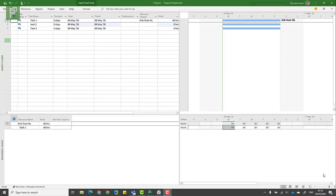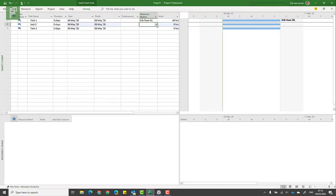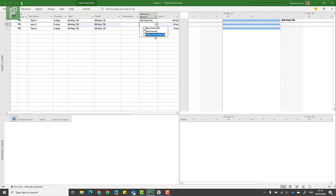To do this in Microsoft Project, you actually need to create your own calendars for those time zones. Let's head over to an example schedule that I already created. It has three resources on it: we have Eric from the Netherlands, we have Dave from the US, and we have Steve from Australia.